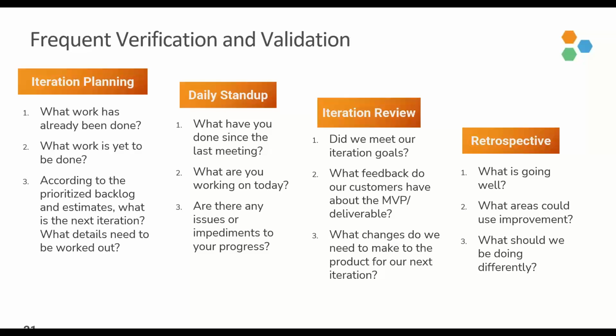So we're getting feedback, we're potentially reprioritizing the backlog based on the feedback, and we're then going into the next iteration. Whereas the retrospective is kind of like a lessons learned. This takes place at the end of each of those short time-boxed iterations. And it's an opportunity for the development team members to inspect and adapt their methods and teamwork. How are they working together? How can they continuously improve? It's a part of that mindset of continuous improvement. That's a retrospective.